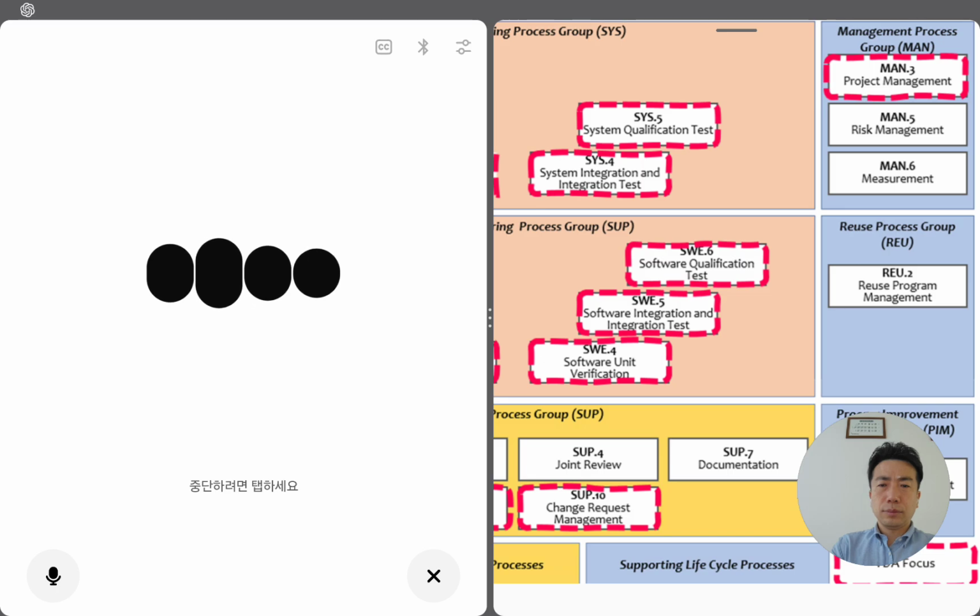If someone wants to change anything after a baseline, they must raise a change request, CR, and get approval from the CCB. Quick tips: keep the list short but complete. It's okay to hide extra rows for small projects. Use consistent IDs, it helps traceability. Put the file list under CM control, SUP.8, and review it weekly in your PM meeting.